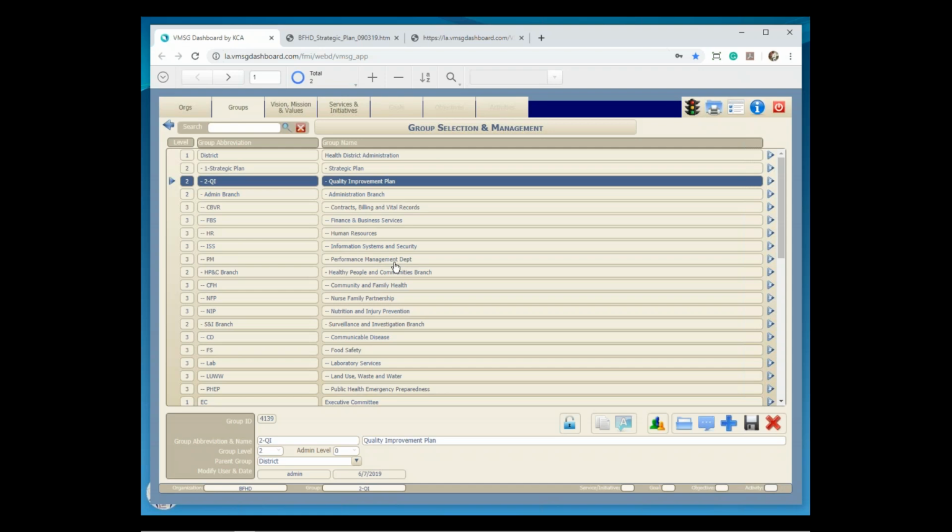Typically, what you have in here is a work plan, and it becomes a subset of the final plan because, for lack of a better term, there's a lot of fluff in the big plans. You know, who did it, what's the process we went through, everything that you're going to put around it. Then you get down to the work plan at the end. So what you can do is export the work plan here to a Word document and incorporate it right in with your plan so that you always have an updated version of it in there.